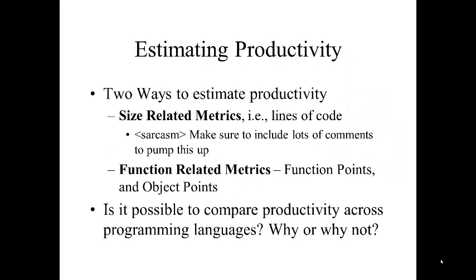Two ways to estimate productivity. One is size-related metrics — basically lines of code. There are real problems with calculating productivity based on lines of code: what is the complexity of the code being developed? Not all problems are equal. What language is the code developed in? Think about the instruction explosion from C++ down to assembly language — one line in C++ can take three lines in assembly. Is the programmer padding their code to look more productive? You really have to approach this like Fagan inspections and not use the data for performance evaluation reviews.